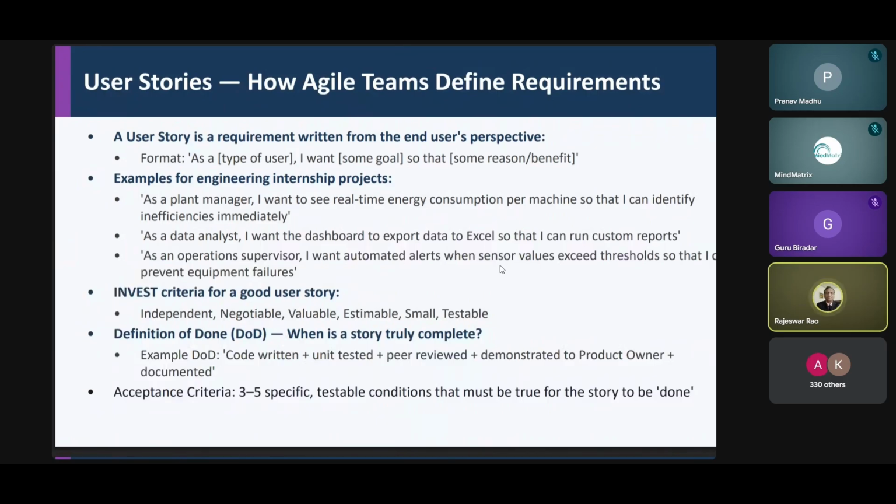A simple English storyline. It can be written on the board, but it's up to the requirement and the entire project team to break it down into use cases, the DFDs, the ERDs, the data flow diagrams, and your development project. So the user story lies between the PRD and the use case.